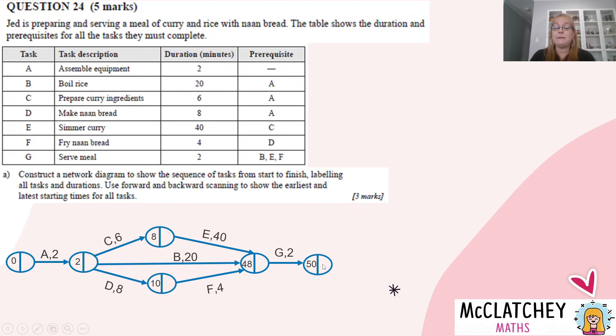Then in this last part of the bubble, we start at 50. And we're now going to backwards scan through the network. We've done the forward scanning, now it's backwards scanning time. So going back 50 take away two gives us 48. So we'll come across here, 48 take away 40 gives us eight. And then 48 take away four gives us 44.